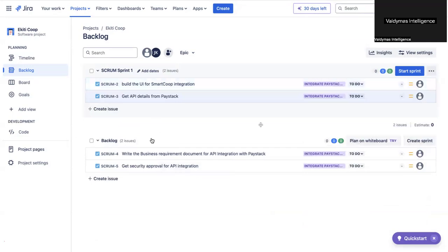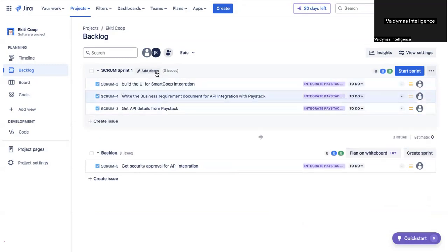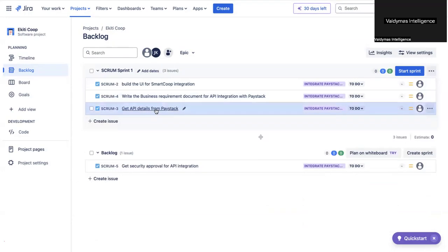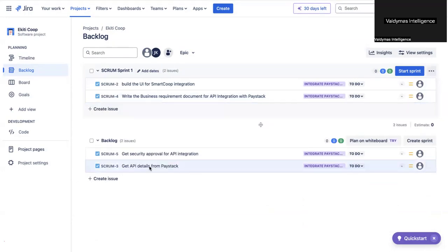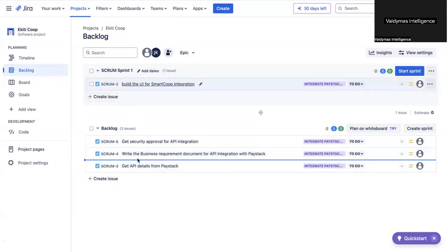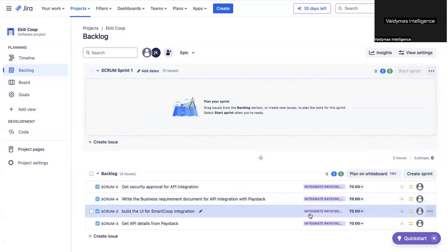So while we're waiting, you can see me move something from the backlog here to the sprint one tentative that we've not even started, but I can start it today if we agree on the date and the timeline we use for our sprint. So I just drag it back. If anything is no longer needed, I can drag it back to the backlog. So when I was always talking about you have stories in the backlog, this is exactly what I was saying. Now we have just 4 stories in our backlog that are in this current epic.